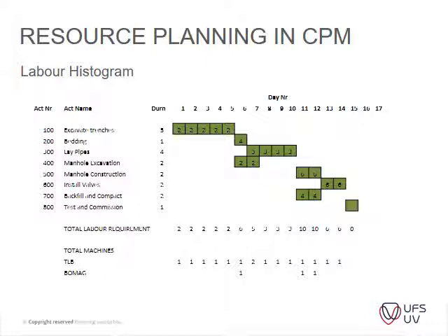You list the items and you draw your Gantt chart, and nicely in Excel you can put in your labor requirements. Here they only put in the labor requirements, so the amount of plant is listed at the bottom. You can see how the labor is added up. It goes up to 6, 5, 3, and then you peak at 10 here.